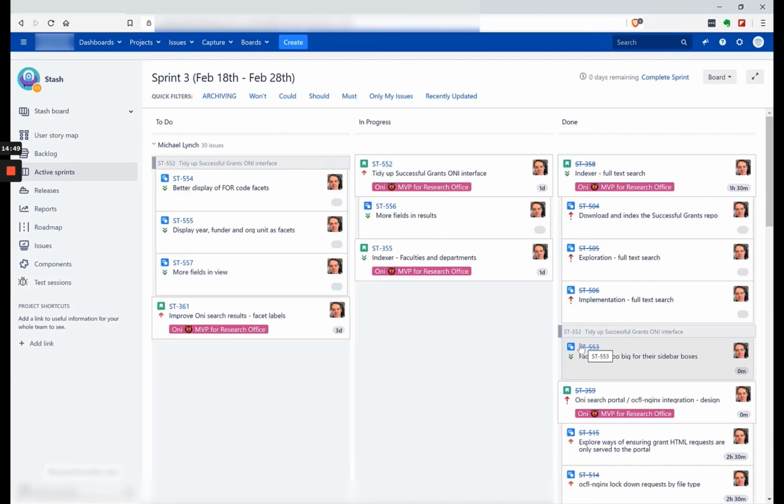So generally a user story has that structure because we're trying to clearly state and define the user story itself: what it is that we're doing, who's doing it, and why we're doing it. What's the value of doing it, right? Because a lot of Agile teams might be very mature with the Agile methodology, like this project team in this example, we're not using that long structure because it takes a lot longer to write "as a, I need to, so that" for every single user story.